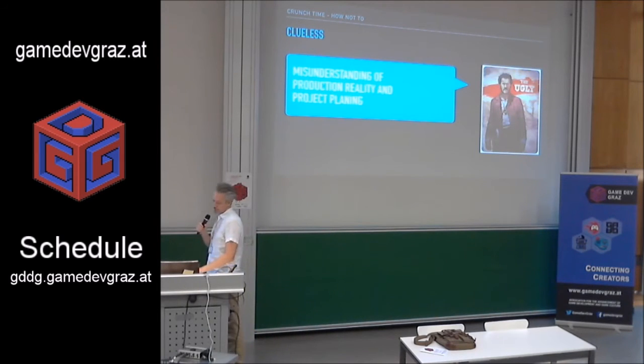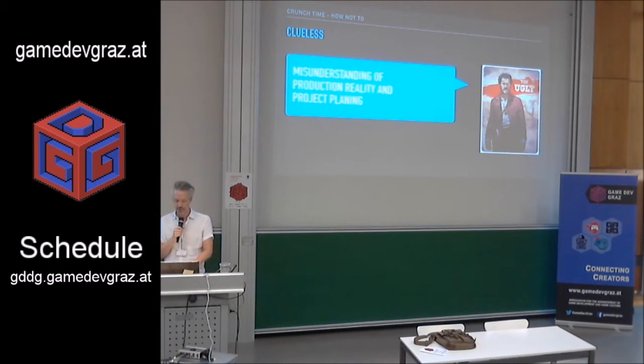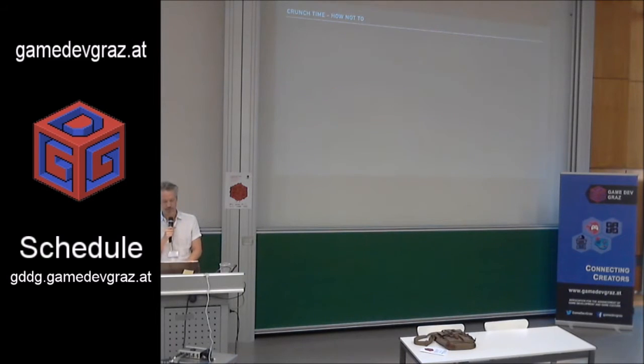So I had a few extra questions, and it came out that they didn't have a proper storyline, they had no storyboard, they had no animatic, they didn't think about all the special effects for a thunderstorm and the rain. They had nothing, and they wanted to be done in 2 months. That's ugly. We made it in 4, but it was no fun. So this is the really ugly version of something like a project you don't want to be in.